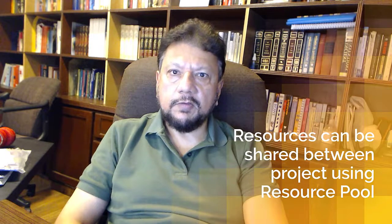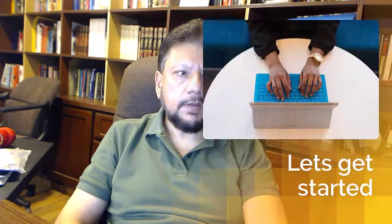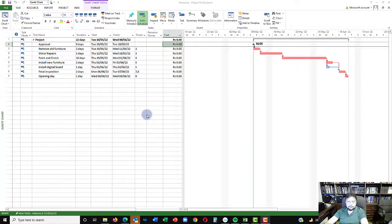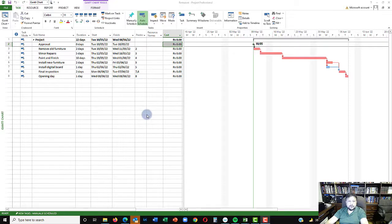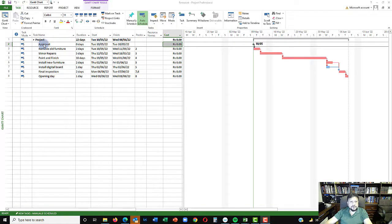Let's get on with the demo. We are here in Microsoft Project and this is my first file, called 'restaurant,' which will be our master project. It's basically a renovation project for a restaurant, with activities including an approval milestone and then removing the old furniture, doing some minor repairs, paint and finish works, installing new furniture, installing a digital board, doing an inspection, and finally the opening day.